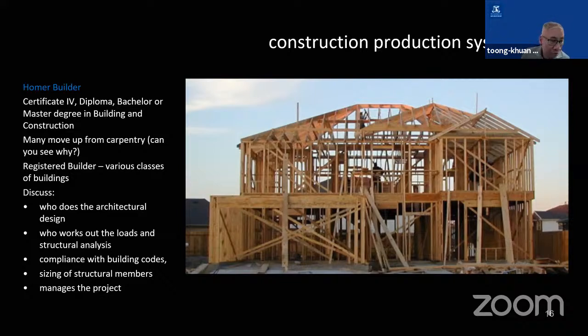What the builder does not do is the subcontractor's work. So if you look at this house, very often the builder is also the carpenter because that is the main structural component. The builder will engage a subcontractor for plumbing. They will engage a subcontractor for electrical work. They will engage a subcontractor for brick laying, for roof, for flooring, the floor covering, so either tiles or carpet. They will also engage another subcontractor for walls. So many of those trades are subcontracted out. So the builder generally only does project management or carpentry work.